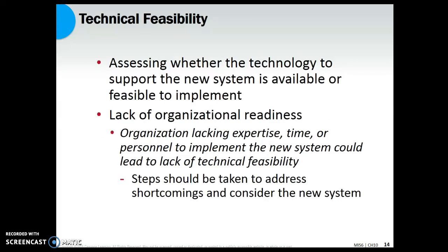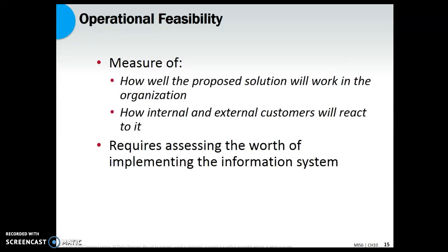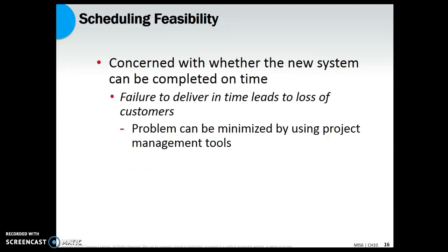There's the technical feasibility. Do we have the people with the skills necessary to accomplish what we want to accomplish in an SDLC project? We have to find out if that's there and whether we can accomplish it, or if we need to bring people in that can help us with that particular part of the project. There's the operational feasibility. How well will the solution work? And then there's the scheduling feasibility. How long is it going to take? What happens if we don't deliver it on time? All of these things need to be looked at as you're working through a project.